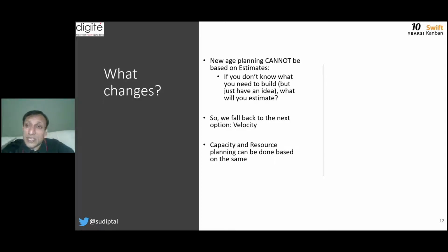So we essentially say, okay, if I have a team that can deliver 100 cards per month, or 100 points per month, whatever is the unit of measurement that you're comfortable with, and I now have an application that needs 200 points per month to be delivered, I know roughly what I need to do to be able to scale to that size of delivery.